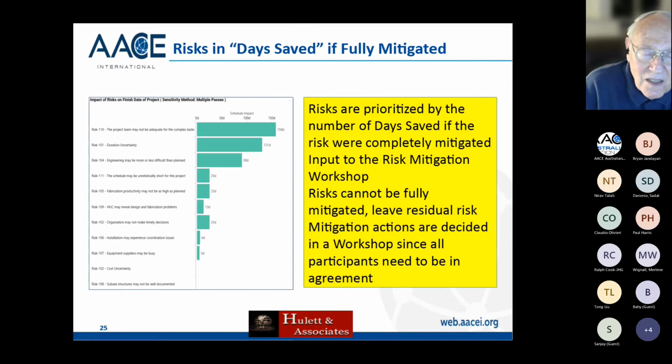And this is the histogram. This is the tornado diagram. Usually, tornado diagrams say what the correlation is between the activity duration and the finish milestone, or if you're using risk, what's the correlation between the risk and the finish milestone? So somebody says to management, if you give me $5 million, I'm going to reduce the correlation of that with the final milestone from 70% down to 20%.